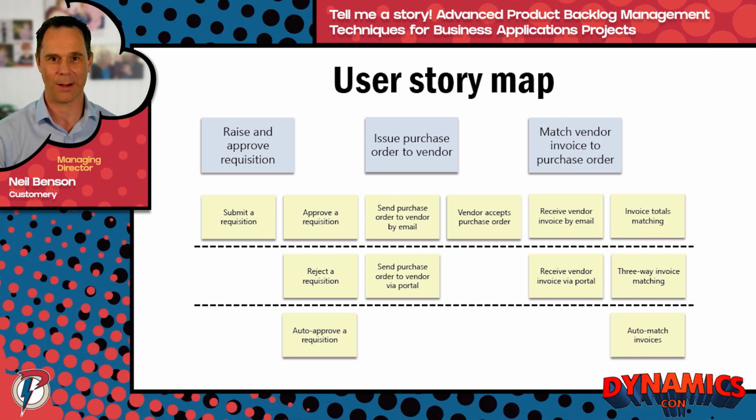Next, we slice our story map horizontally. If we're doing long-term project planning, each slice often represents a release into production. If we are doing medium-term release planning, each slice might represent one sprint. How do we know how many steps we can include in a slice? We need to estimate the work.